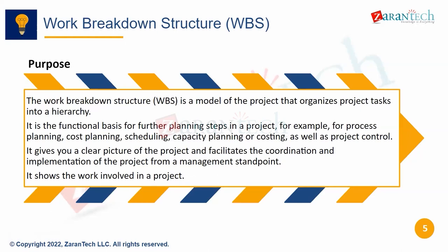He will involve the team leads and the team members who are working on the project, because they know the nitty-gritties and the intricacies: what is required, what tasks are required, how much time it will take. Usually you have optimistic and pessimistic schedules, but then you use the realistic time schedule: how much duration each activity will take, and what the dependencies are. I need to finish a particular activity before another one can happen.